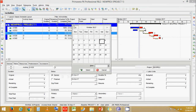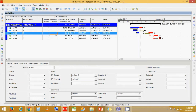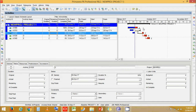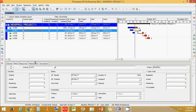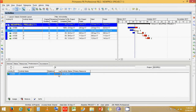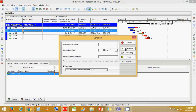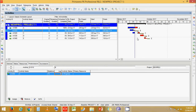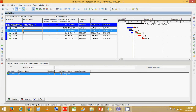Now say activity C is also in progress with two days remaining duration. If we schedule it again, we can see that activity C's sequence is broken — the start and finish are on a different path. If we change the relationship from Finish-to-Start back to zero lag and schedule it again, activity C starts exactly after activity A is completed.